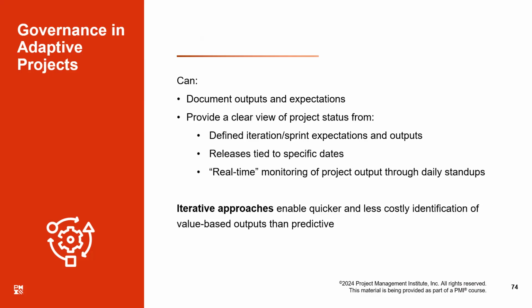And the level above that level is providing governance for the level above us. Normally the lowest levels are called Scrum teams. The next higher level is called Scrum of Scrum teams. If there are 10 teams in a Scrum of Scrum, then we have got a Scrum of Scrum team. The Scrum of Scrum includes 10 Scrum teams. And if there is yet another level, it is called Scrum of Scrum of Scrum.